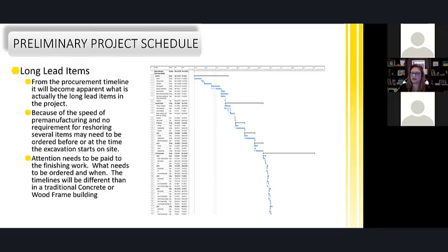So things not necessarily apparent: the millwork actually needs to be quite a lot earlier. You need to consider other things in your envelope panels and how that's going to come together and how that's going to affect the rest of your space and all of that timing.